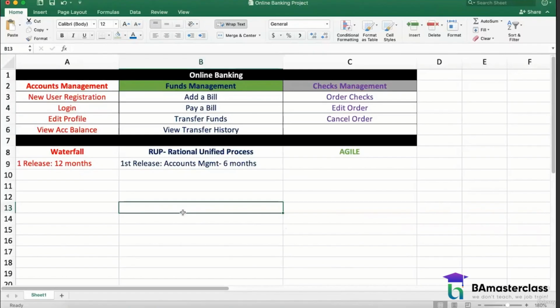So the last sentence that I made you write: who then identifies if they want to implement the change as a part of this release or as an enhancement to a future release. Anyone understands what that means? It means you could either change this particular piece or let this be and update that in the next one. Perfect.